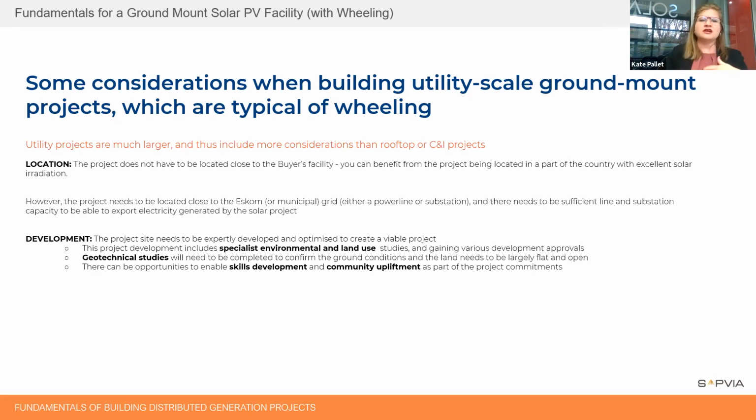And the second will be geotechnical studies, which will need to be completed in order to understand the ground conditions, what the wind is like on site, what the soiling is like, and all of those kinds of things that will actually affect the output of your solar system.